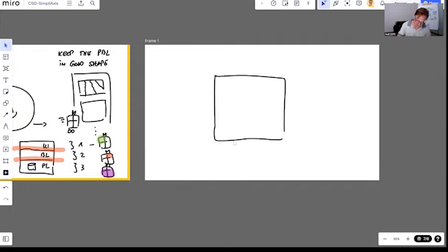Vertically slicing means, okay, if these are my technical layers, you would say, okay, slicing it could be like that, like kind of a vertical slicing. So here we could say, if the functionality, the value that you need, the problem, is paying by a credit card, you could say, okay, let's make this here first. It could be, for example, paying with credit card, but only MasterCard.